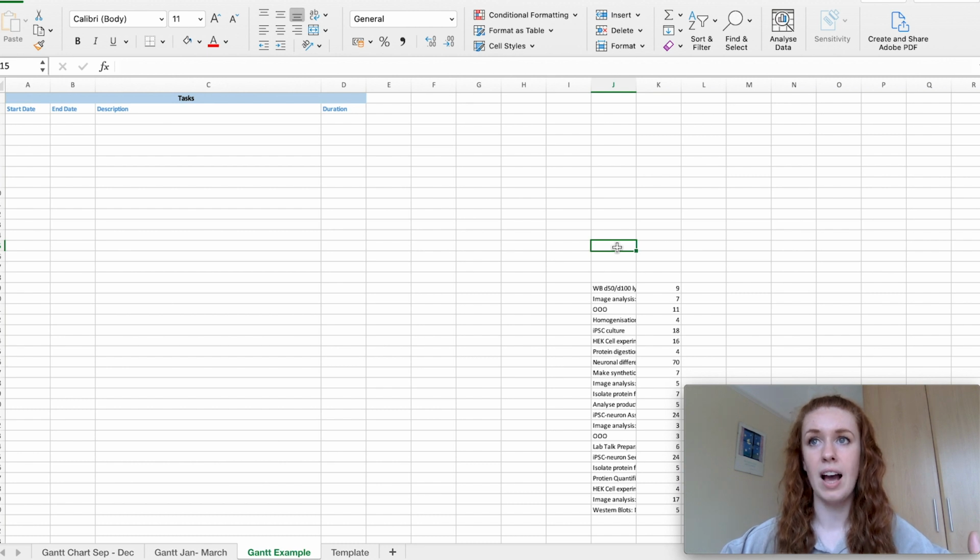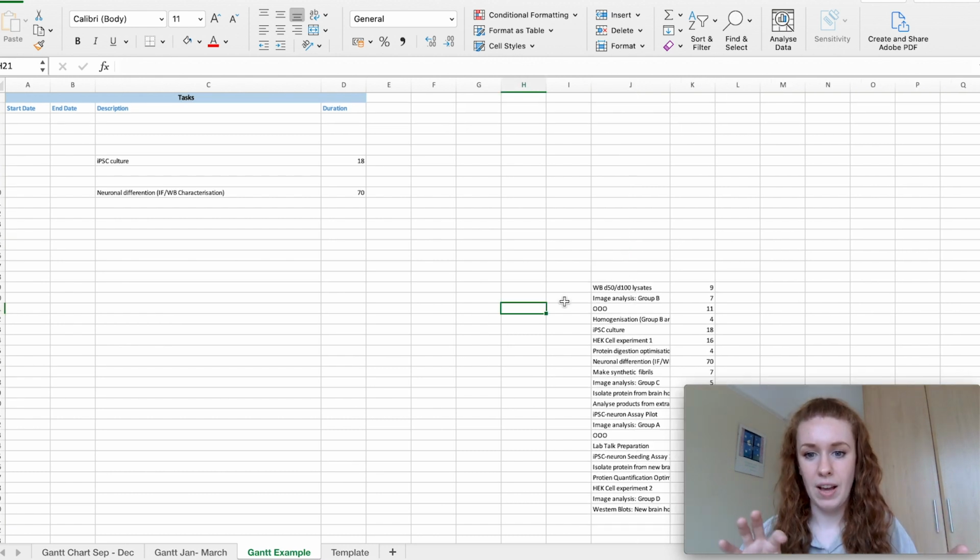So the first thing that you should do when you're making your order is to think about the tasks that are going to take the longest time. So for me, my tasks that would take a really long time in my PhD were my cell culture tasks. So really getting in those long tasks first is important, because you need to start them off so you can actually get them finished in a 3-month block.